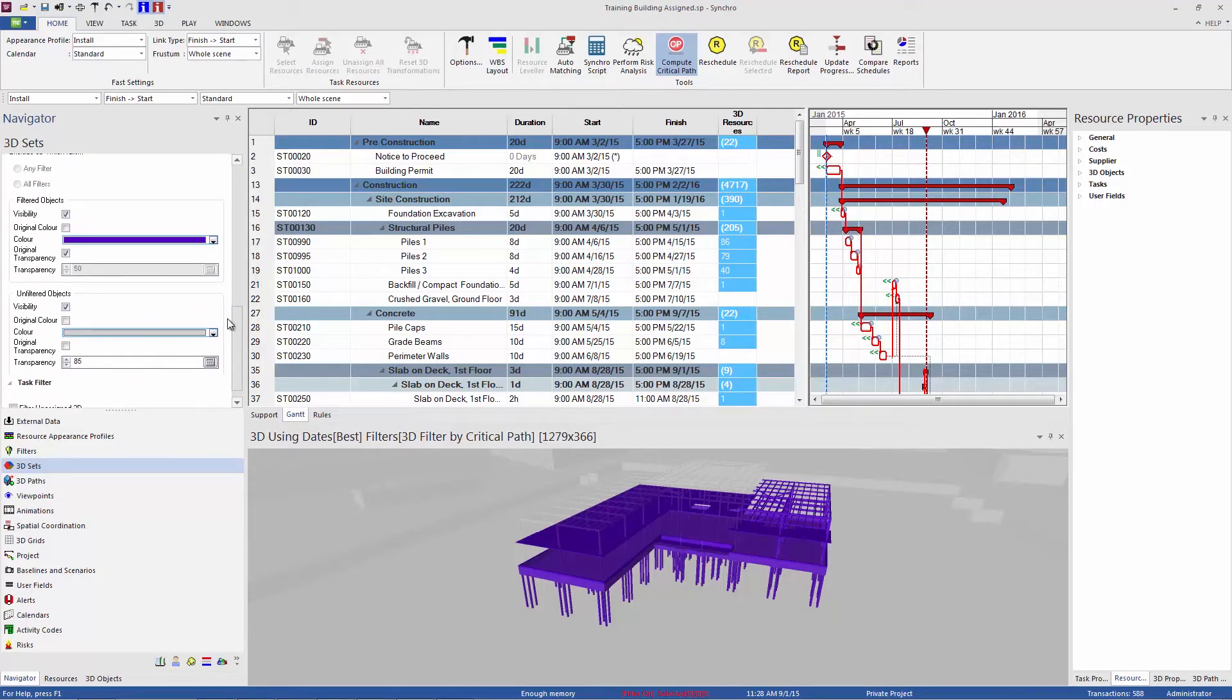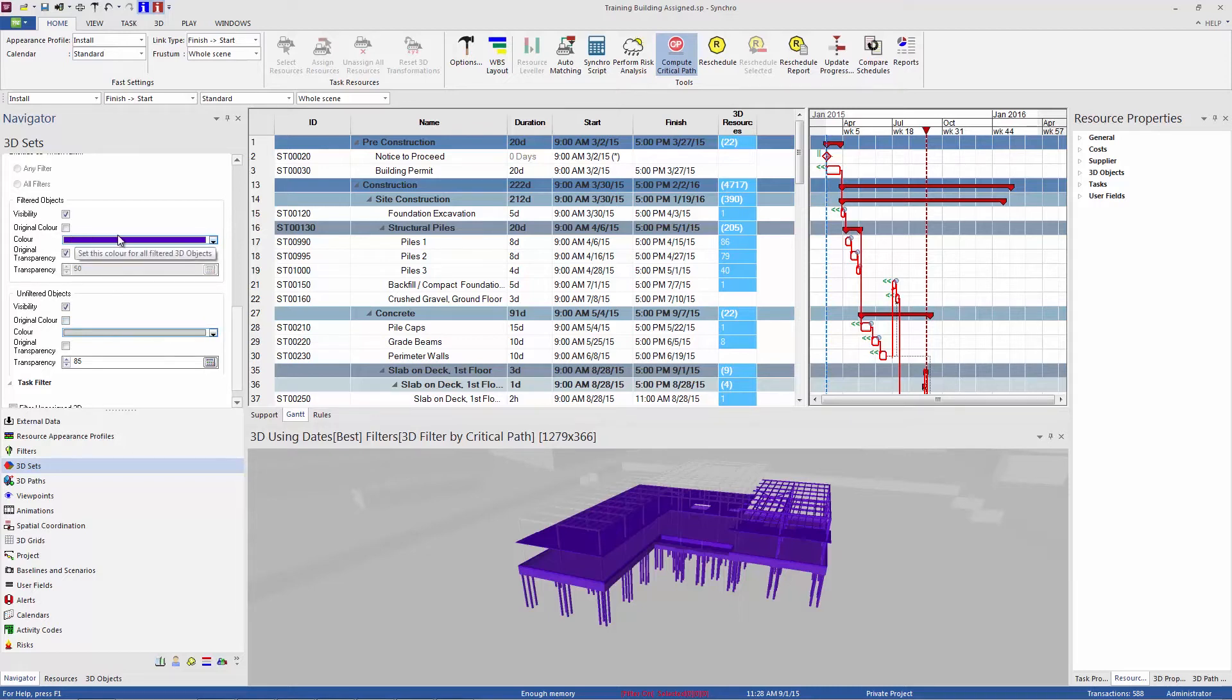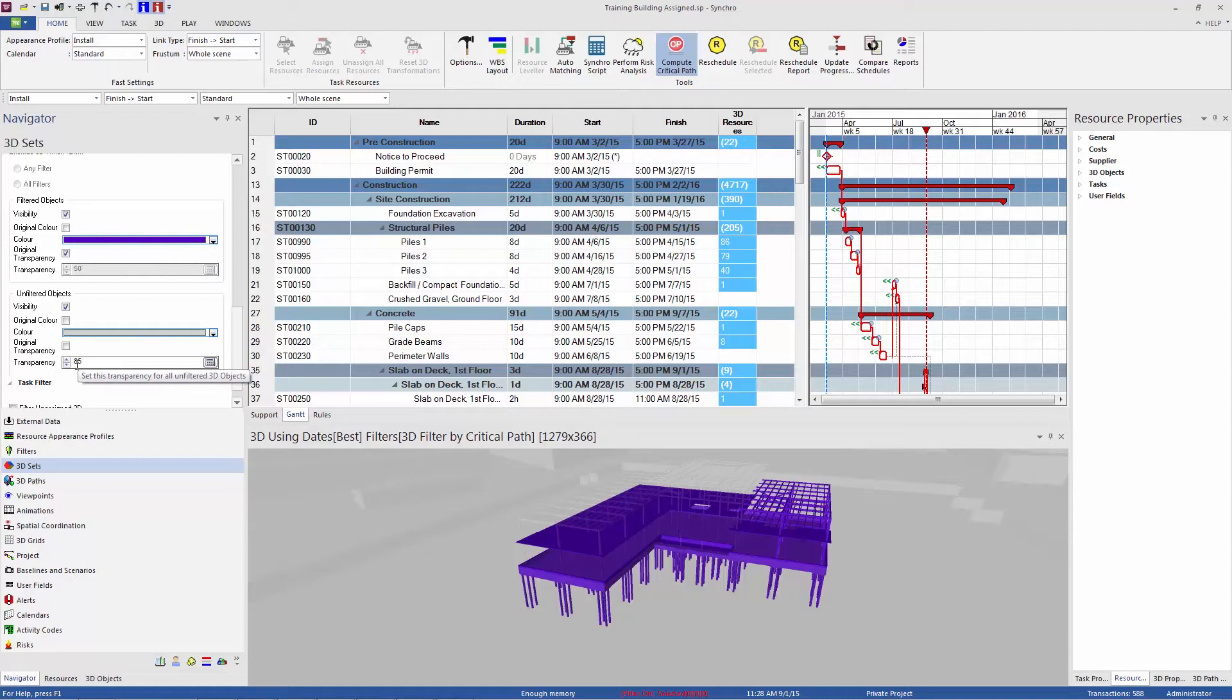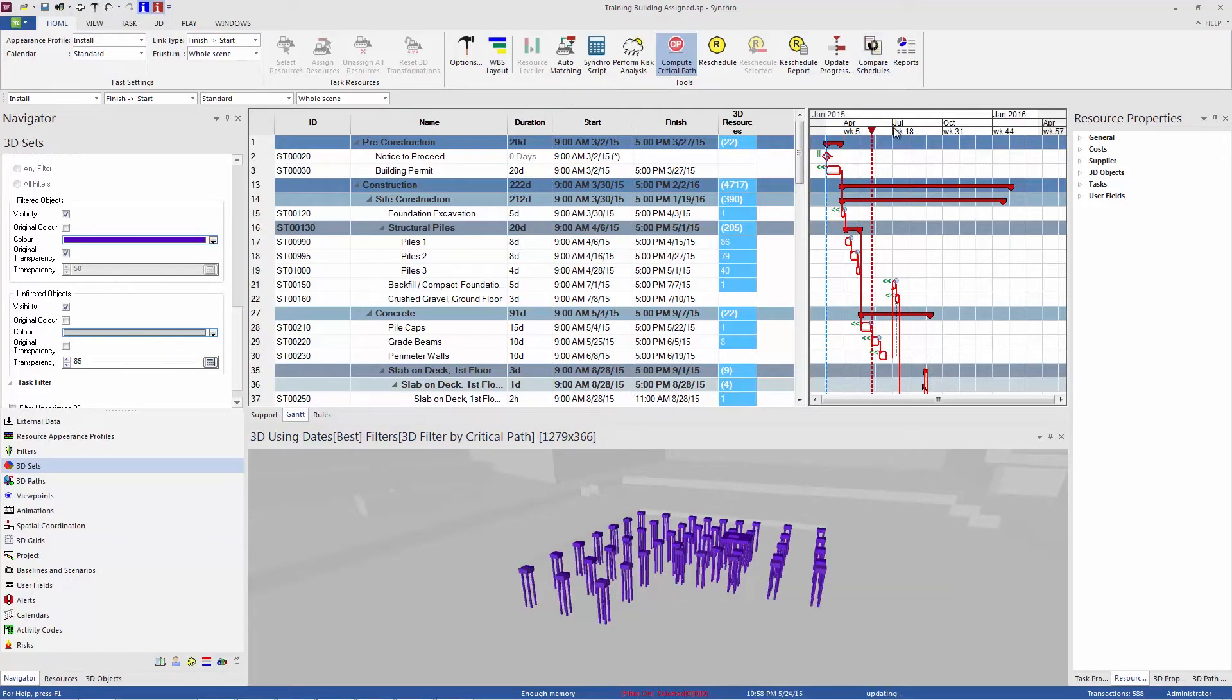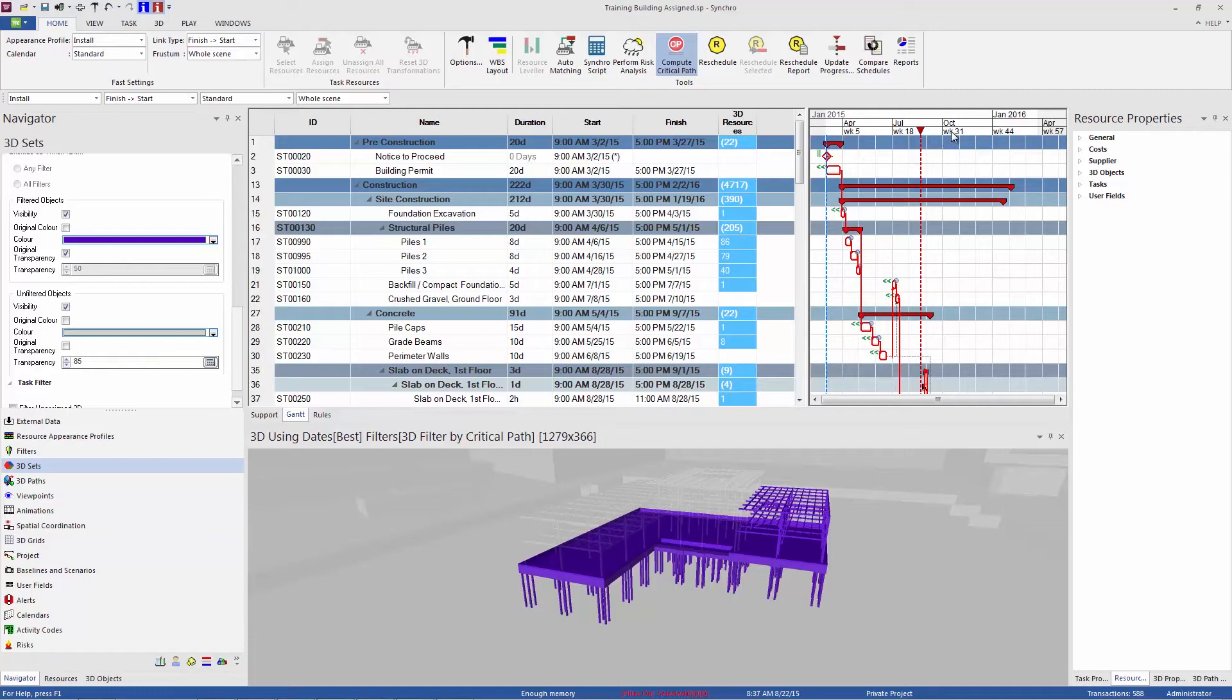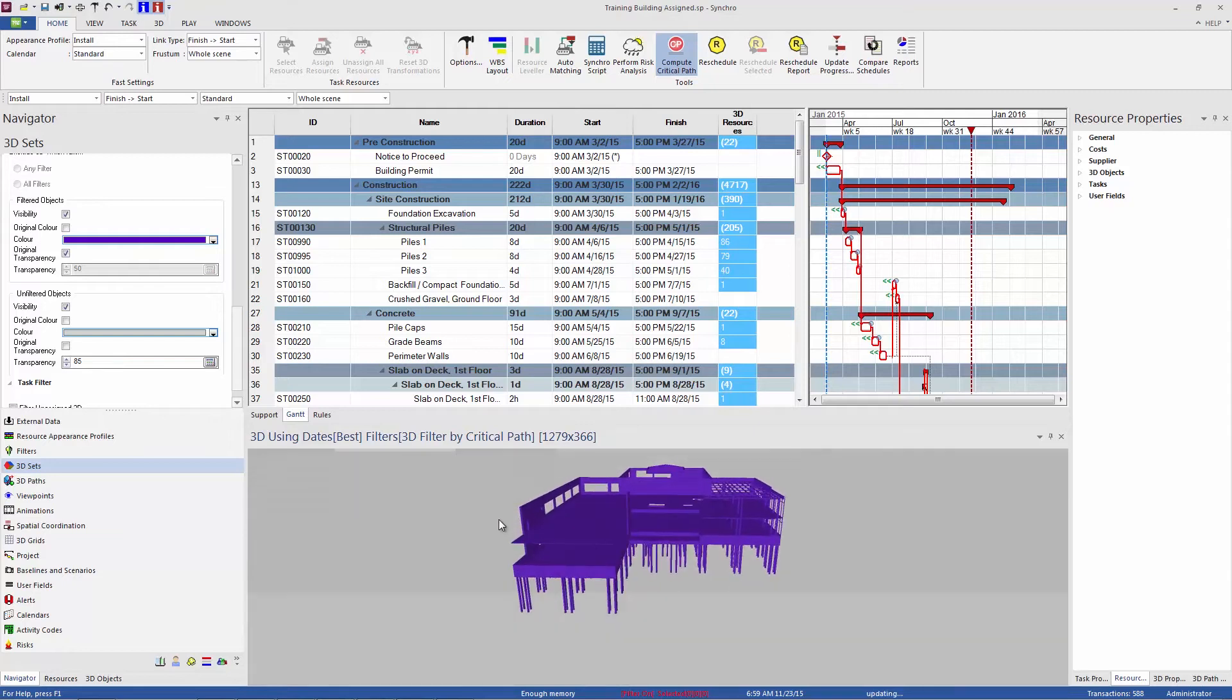And we've applied automatically a color scheme here. These color schemes can be applied to any of your filters manually, but this one was generated automatically for the critical path. So objects that are on the critical path are showing up here in purple, and then objects that are not on the critical path or objects that are just in context, they're not assigned to any task at all. So any unfiltered objects are showing up in gray and mostly transparent. So as we move our focus time through the schedule, we're seeing our critical objects highlighted for us so we know what the important tasks are, and everything else is just ghosted in the background in transparent gray.